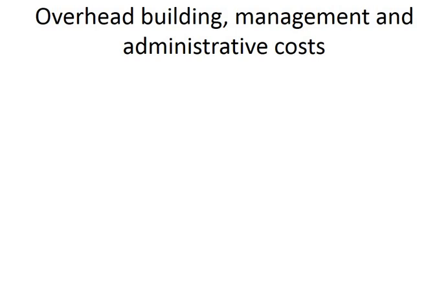So those costs are not connected to particular tasks. Okay, so the cost for the office of the total endeavor is not connected with just the foundation or just the walls or just some finishing at the end.